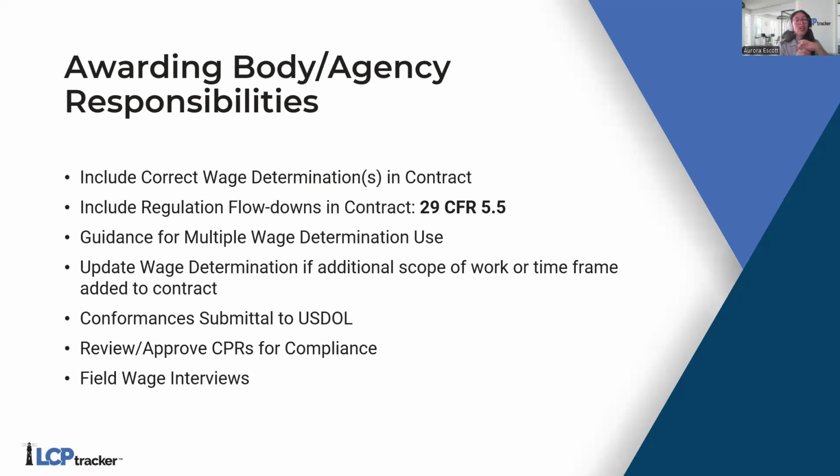Awarding bodies are responsible for submitting the conformance requests to the Department of Labor. And we're going to talk about what a conformance is. They're responsible for reviewing certified payroll reports, and they're also responsible for conducting field wage interviews. And we're going to go into those as well a little later.